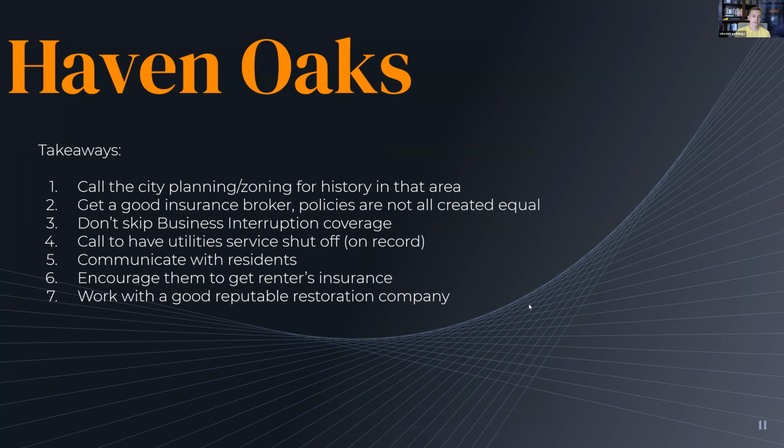All right, so takeaways of this. Obviously, as the operations officer for the company, I'm very heavily involved in the renovation, remediation, getting this place back operational. So key takeaway for this was, before we bought this property, I call the city departments, either planning, zoning, or the Chamber of Commerce, usually in the smaller towns it's all kind of one small office. And I ask them, especially if I see anything weird on FEMA maps. I didn't put that on here, but I thought I did.